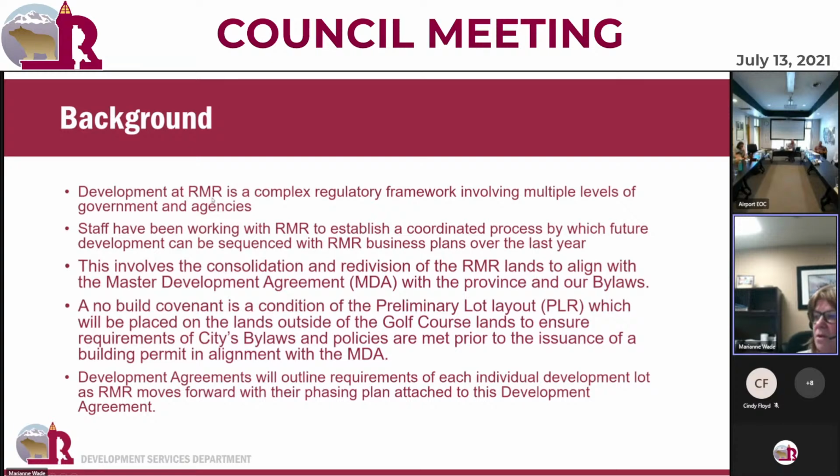So what we've done is we've been working with RMR to move forward with a sequencing and development so that we can basically isolate development pods and then work through those development pods in an orderly manner, dealing with past deficiencies, the requirements in the bylaws, requirements in the master development agreement with the province, and have an orderly way of moving forward.